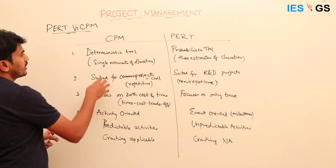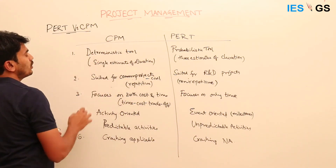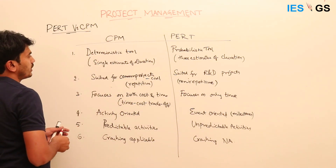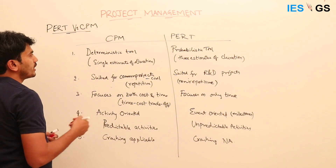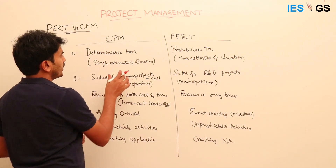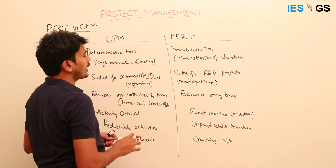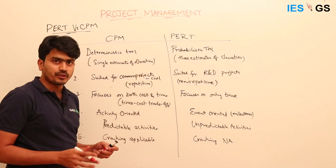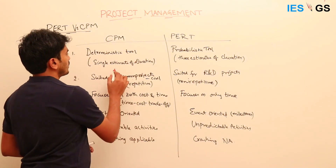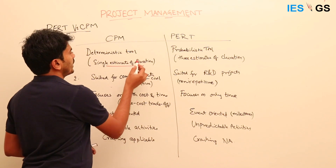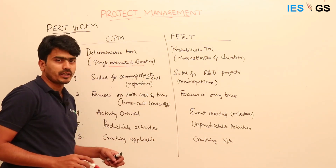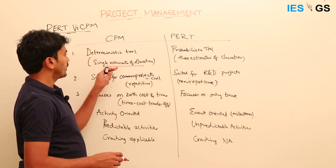CPM is a deterministic tool in the sense that it uses a deterministic value for the activity duration — a single estimate, a known estimate.